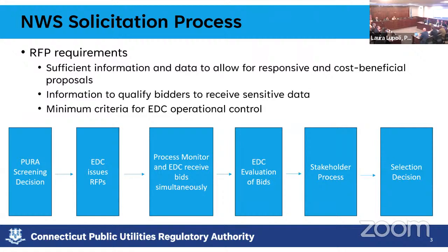I can quickly go first. So I think that might be another one of the topics where I don't see it as being a big issue, but where there wasn't 100% alignment, the companies had opted to not release those criteria. That's just standard business practice. We do not release evaluation criteria on any form of RFP we do, because it would allow bidders to game the response, right? We want them to be as transparent and as forthcoming in their response and put their best foot forward and not gear that response specifically to what they know we're looking for.